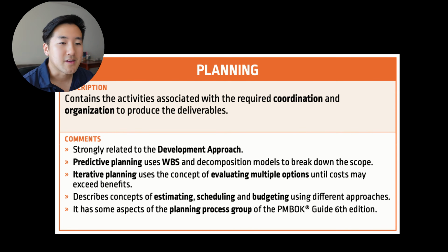I think the main thing here is start big picture, think about what the result or the end value is for the client, and then work backwards from there. So for instance, if your project is to build a house, start thinking about what kind of house the client wants. Then take a step back. In order to build a house, what do you need? You need certain types of tools. You need certain types of labor. You probably need a lot of supplies. Work backwards and then try to get as granular as you can.